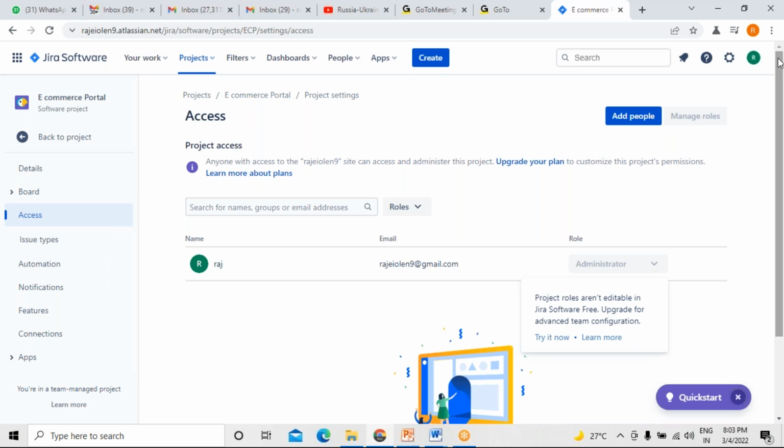So the first sprint four, second sprint four, eight completed. So I think you will know the capacity of our team. Based on that, how many more sprints need to be created and what the length of each sprint should be, whether it can be completed in 1 week, 2 week or 4 week sprints, that will decide. But make sure it must be within the deadline of the release planning we have made. Understood? Clear?